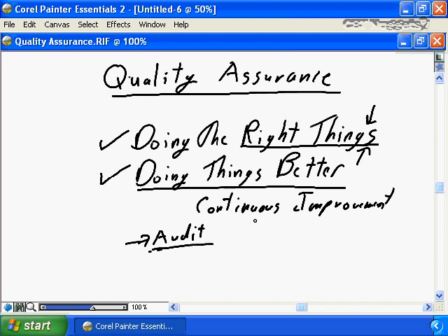Often, the continuous improvement is the root cause analysis. Why are problems being discovered on the project? Why are we identifying 3 and 4 and 5 errors per walkthrough? Are the requirements incomplete? You do the root cause analysis, as part of doing the quality assurance process, to ensure that all actions on your project are meaningful and that all actions on your project are contributing to the final deliverables that will be signed off and approved by your sponsor.